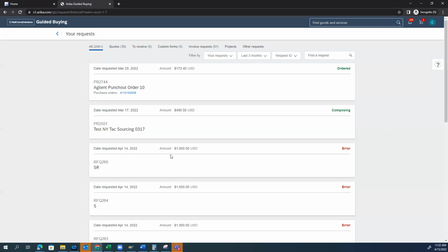By default we are saying yes, and if you say yes at the time of PR creation, invoices are not automatically processed. So the requisitioner has to review that the work is complete, and only then can AP make that payment to the supplier, okay? So don't worry about the other tabs here.